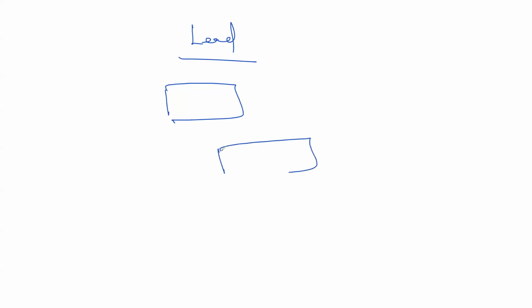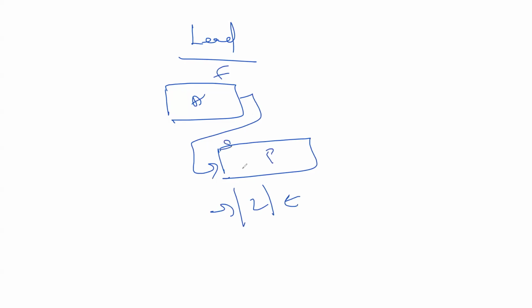If I'm saying before 2 days of finish of A, you can start with activity B, here also the relationship is finish to start, but I am accelerating the start of B by 2 days from the finish of A. If I know that I will be finishing activity A on day 10, I'll go and start activity B on day 8. These 2 days of acceleration is known as lead in project management.